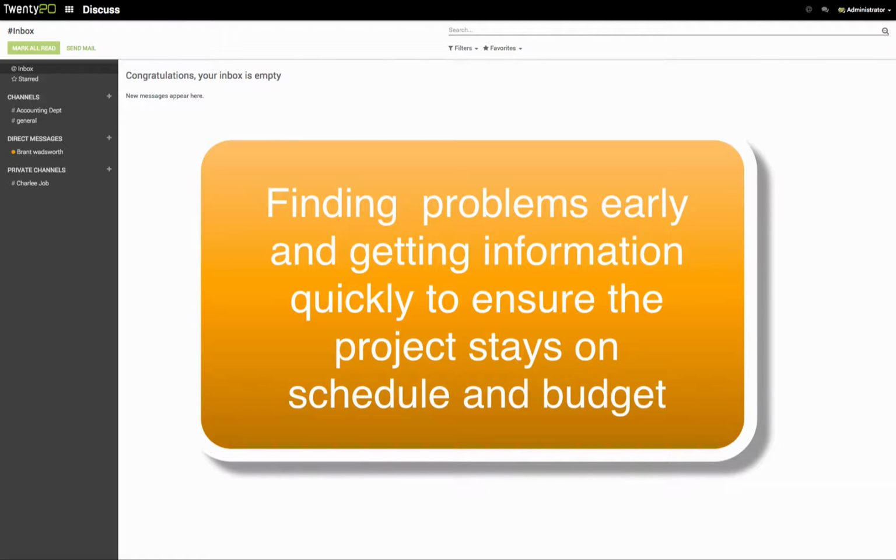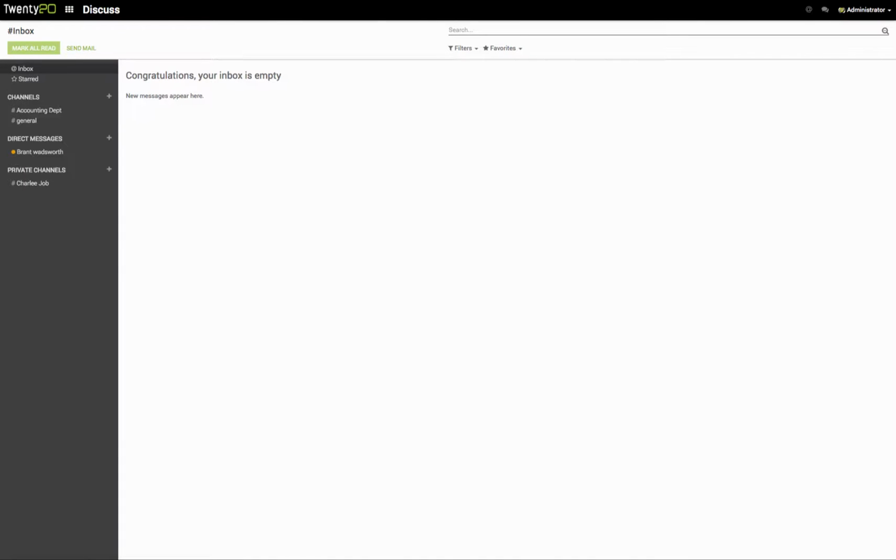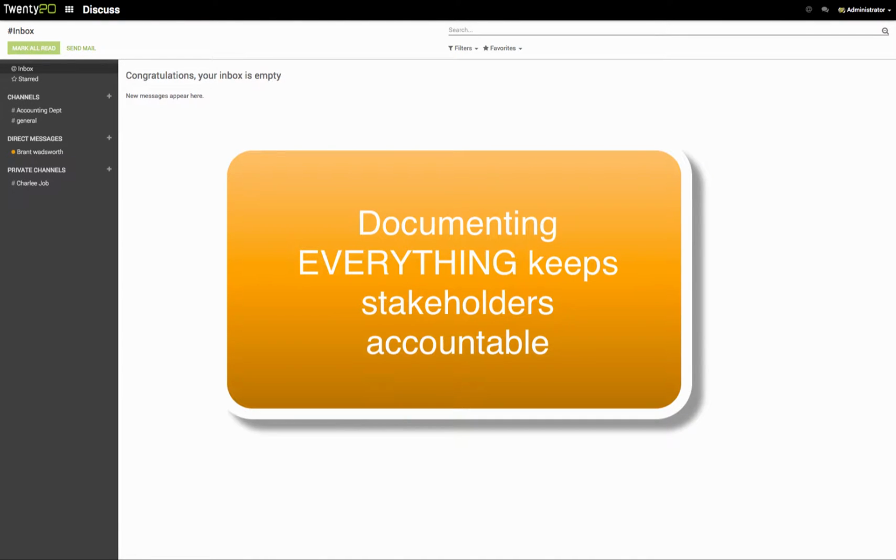Having effective communication and collaboration on the project also helps us mitigate that risk by being able to track and trace all of the communications that we're having, the RFIs that we're sending out, the submittals that we're sending and receiving, and the revisions of those submittals and drawings and delivering documents and emails. Tracking all of that communication into one spot really helps us control the risk and hold those parties accountable that are responsible for the deficiencies that we're having on our projects.